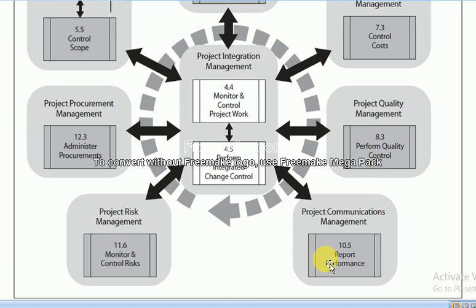Like we can say that after 1 month, 20% of the project activity must be done. In total the project will be completed within 5 months. Now, 2.5 months are over, and more than half of the project is already finished. So we will be sure that our project will be finished on time, because work is done according to the planning.